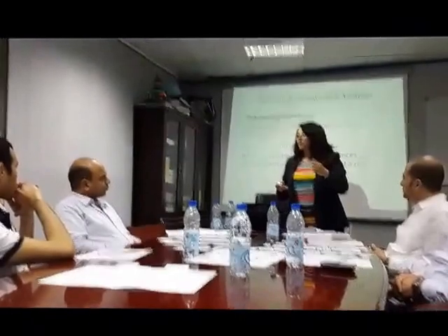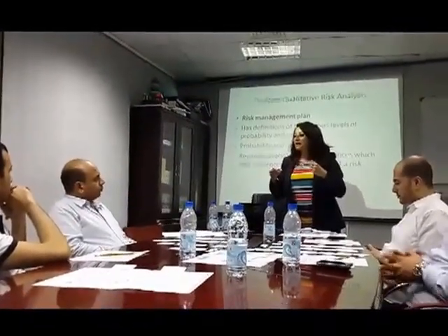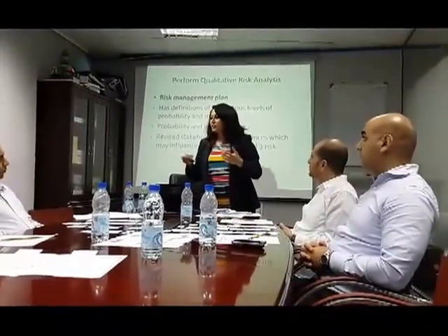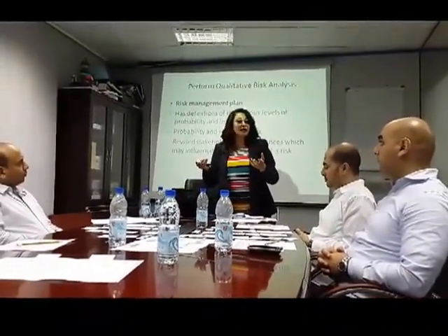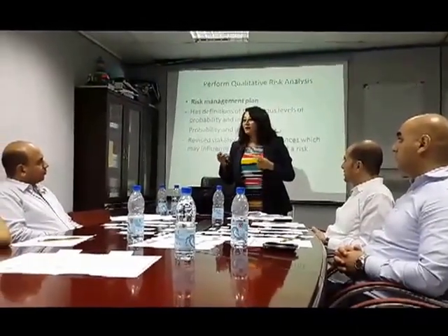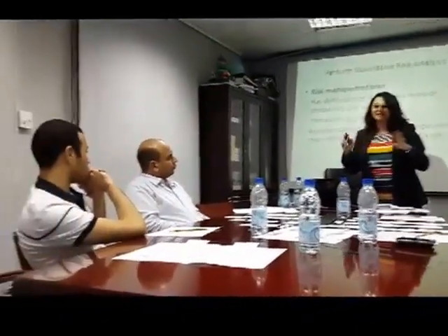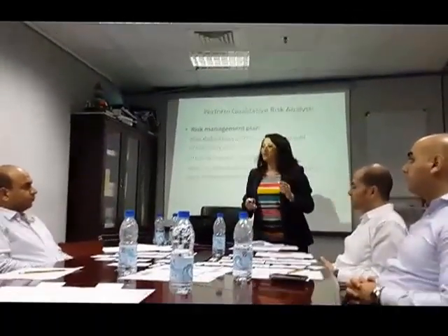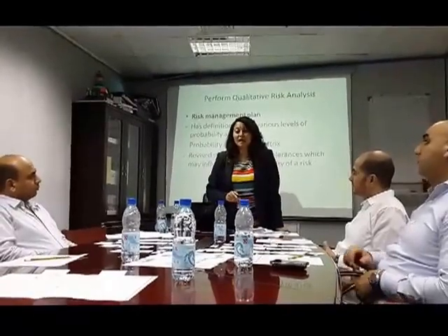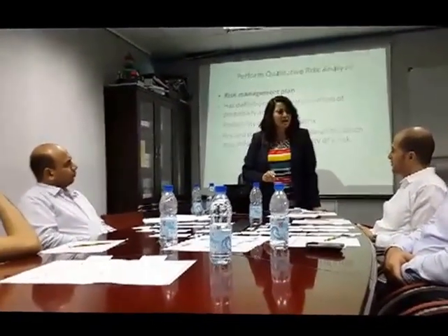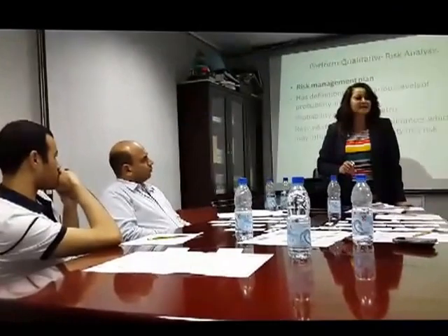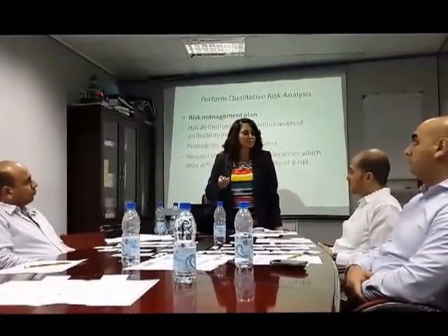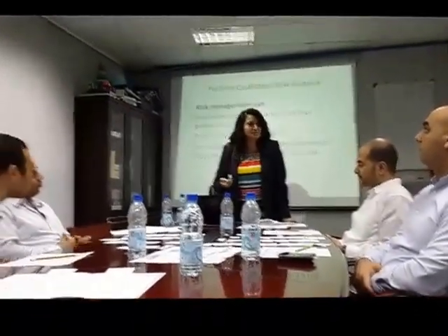So, if a stakeholder has low tolerance for a certain risk, he will rank it high. He doesn't have tolerance to it, so he's going to rank it high. For example, you would get a stakeholder who thinks that customer dissatisfaction is totally unacceptable. So to him, he would put this as a priority. He will rank it highly because it's important to him.